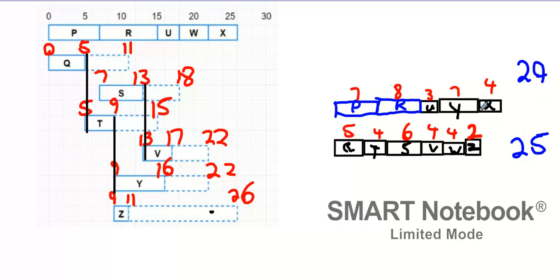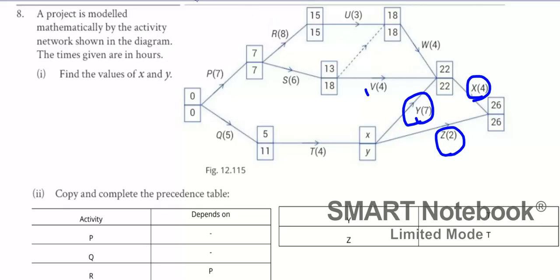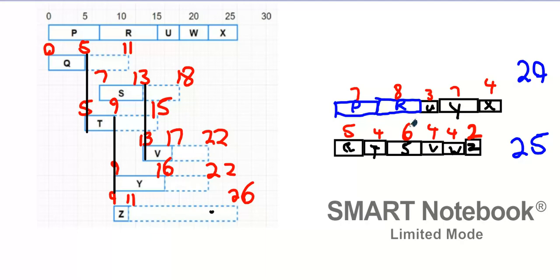Now, is there any issues with this answer? Is the order all okay? To start X, you need Y done. To start Z, you need what you need to start Z. So I need you guys reading off this graph here for me, just to verify that we're okay. To start Z, what do we need? Done already. To start Y, we need? Done already. To start W? They come earlier. Perfect. To start V? Perfect. To start U? We're good now, aren't we?